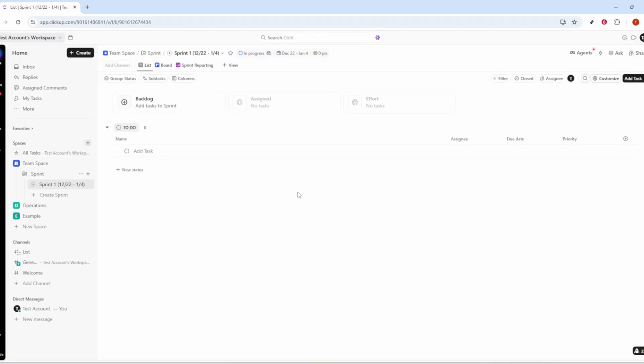Automate sprints can create your next sprint automatically, close sprints on schedule, and move incomplete tasks forward so nothing gets lost. In sprint settings, confirm defaults like capacity, naming format, and whether tasks can span multiple sprints. Keep changes minimal at first, then refine as your team gains experience.